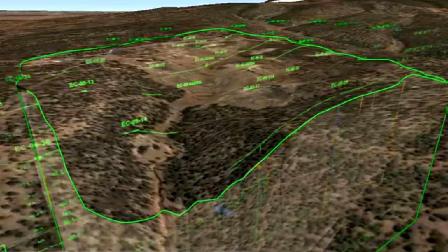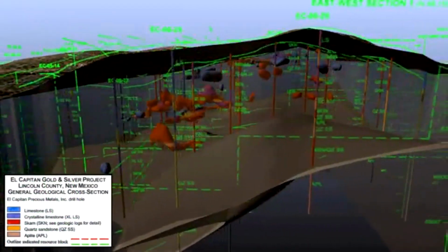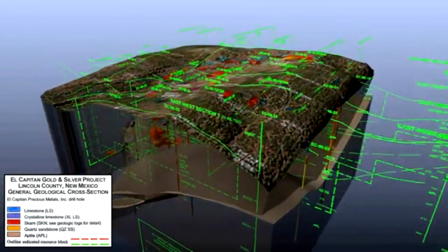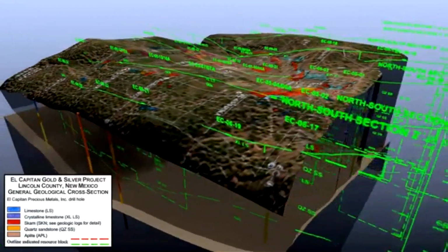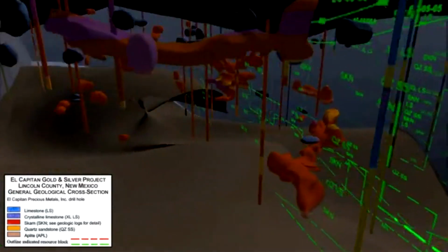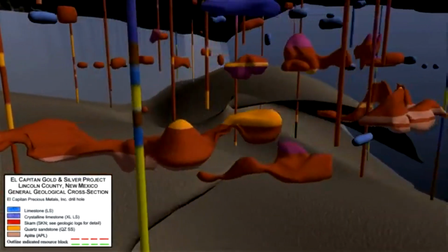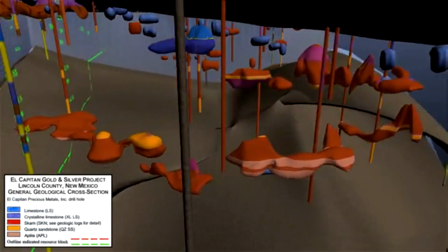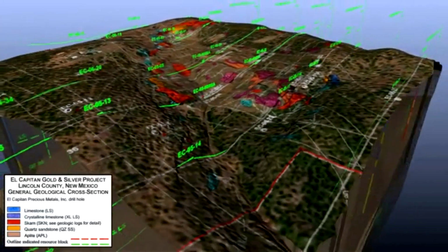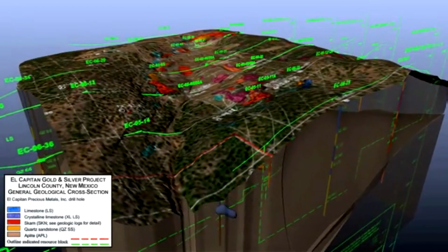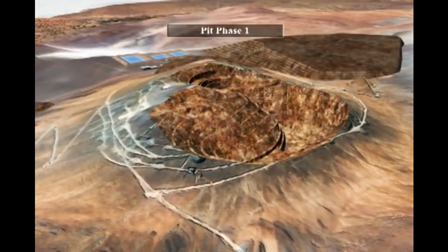Feasibility report template. Finally, here is an outline for the 9 parts of a feasibility report. 1. Executive summary. 2. Description of product or service. 3. Technology considerations. 4. Product or service marketplace. 5. Marketing strategy. 6. Organizational staffing. 7. Schedule. 8. Financial projections. And 9. Findings and recommendations. That final item is broken down into subsets of technology, marketing, organisation, and financial findings and recommendations.